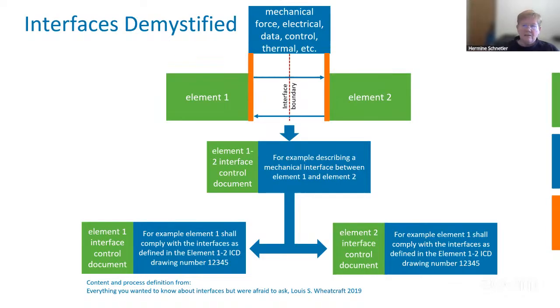And I think another thing, determine the ownership of interfaces is very important, because if you have two elements and there's no interface defined, make sure in your development project, you nominate somebody who takes ownership, defines it, and then once it's defined, the two people can then discuss and come up to a solution to define this interface requirement for you.